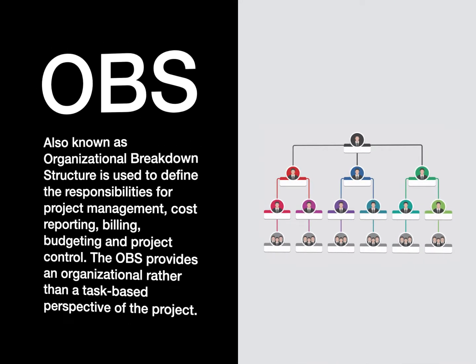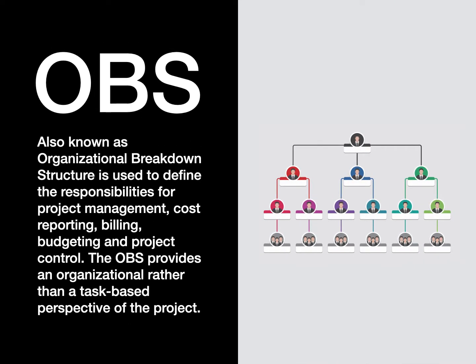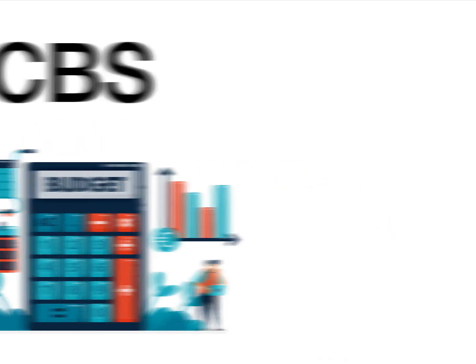OBS, also known as Organizational Breakdown Structure, is used to define the responsibilities for project management, cost reporting, billing, budgeting, and project control. The OBS provides an organizational rather than a task-based perspective of the project. We also have the cost breakdown structure.